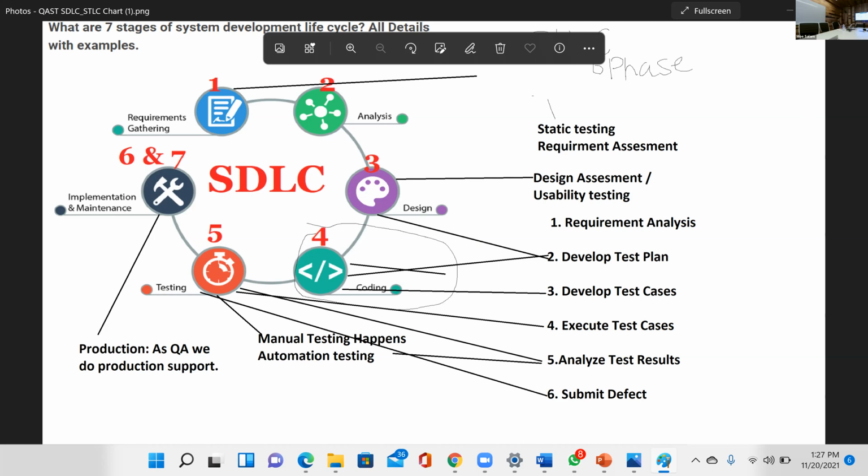So if you think about it, before the developer develops it, you're testing it and finding the defect. If you can eliminate it from an early phase, what are you doing? You're saving the client thousands of dollars, correct? If you can eliminate it from the requirement document before the developer even designs it, we're saving the client a lot of money.